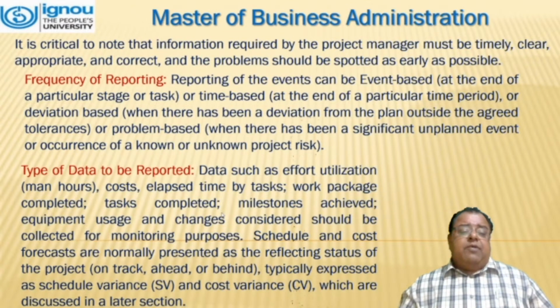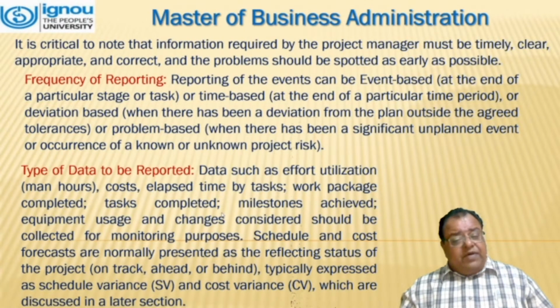Then comes your type of data to be reported. Data such as effort utilization, that is man hours, cost, elapsed time by task, work package completed, task completed, milestone achieved, equipment usage and changes considered should be collected for monitoring purposes.